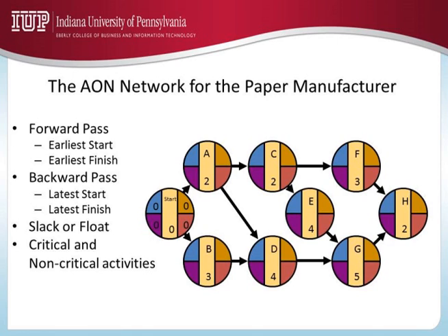If the earliest time you can start is the same as the latest time that you can start, you have no flexibility, you have no slack. But if the earliest time that you can start is week number 5, and the latest time that you can start is week number 7, you know that you have some flexibility or slack.